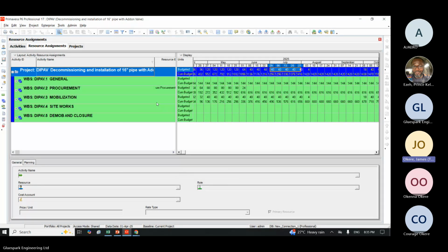So now, in the S-curve, you take note of this. The project name, if I copy this value you see here, is the cumulative, the summation of all the values inside here. If I copy only these two, it is the overall project. In some projects, they want you to do the S-curve or report the project in phases, level 2 WBS.